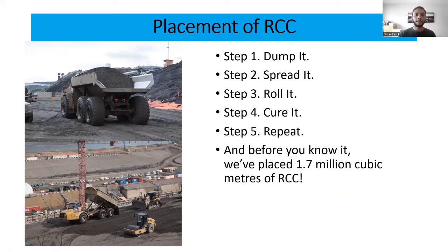And step five, repeat it. Same thing over and over again. So another reason to select roller compacted concrete is that it is repetitive work. And that way, once we train a group of people, they can do the same work again and again, and save us training time, save us mix design time, save us in different aspects, and give us the best economical result.